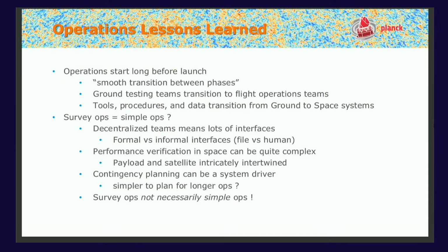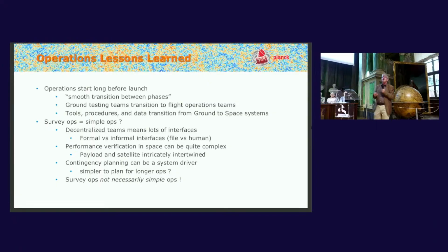And actually, when we started developing Planck, we were given a lesson learned that came from the ISO days, the Infrared Space Observatory days. And that was to do smooth transition between phases, and nobody knew what that meant, really. And I think after all these years, what I would say it means is that basically all of the ground testing teams should become the flight operations teams. And that ensures the knowledge goes through. And at the same time, all the tools, the procedures and the data that you generate during ground operations should also transition into flight.